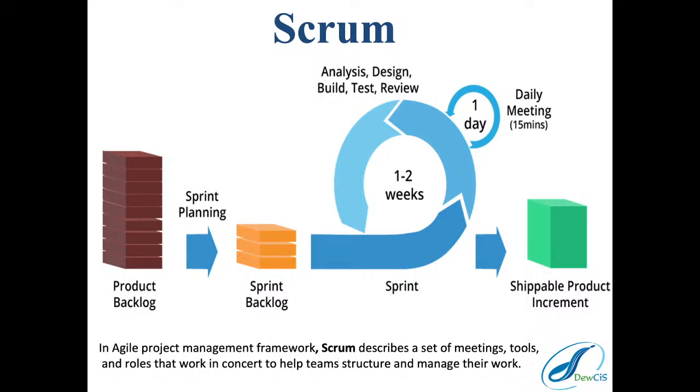Within the sprint, you have daily meetings called stand-ups that should be less than 15 minutes. Before Corona, it meant people physically stand in a small group. And in a stand-up, you say 3 things: what you did yesterday, what you plan to do today, and what impediments you're having.